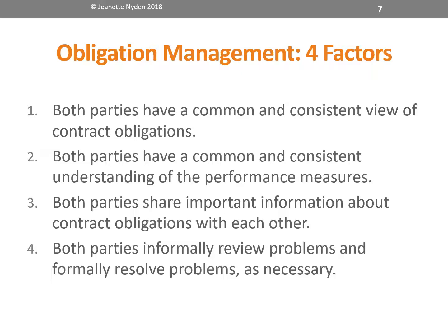Obligation management has 4 factors. 1, both parties have a common and consistent view of contract obligations. I was just talking this morning with one of my clients, and they literally have to come back to a meeting and rediscuss contract obligations because they're using different words to mean different things and they're not on the same page. Even with a word like governance, it means something at the very large customer, it means something very different at the supplier, mid-market, and they're not seeing eye to eye. So that's an absolute obligation. Both parties have to have a common and consistent view.